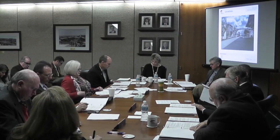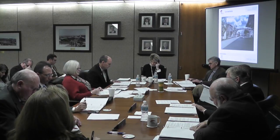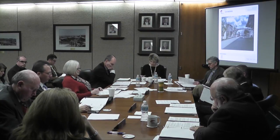And the last one I've got for you here is to approve change order number 4. This is on the rental car ready return facility parking garage project that Crossland Construction is doing for us. The amount of this change order is $6,559 even. It does add 8 additional days, both for the work described here as well as some weather delays that we've encountered in the last month.